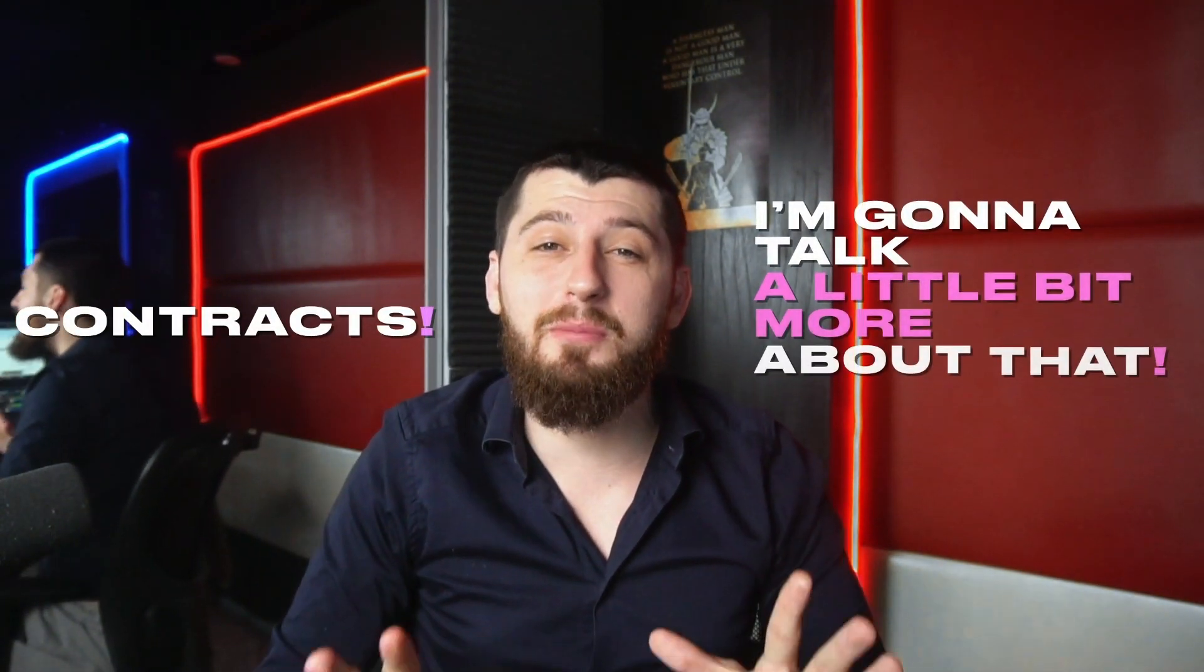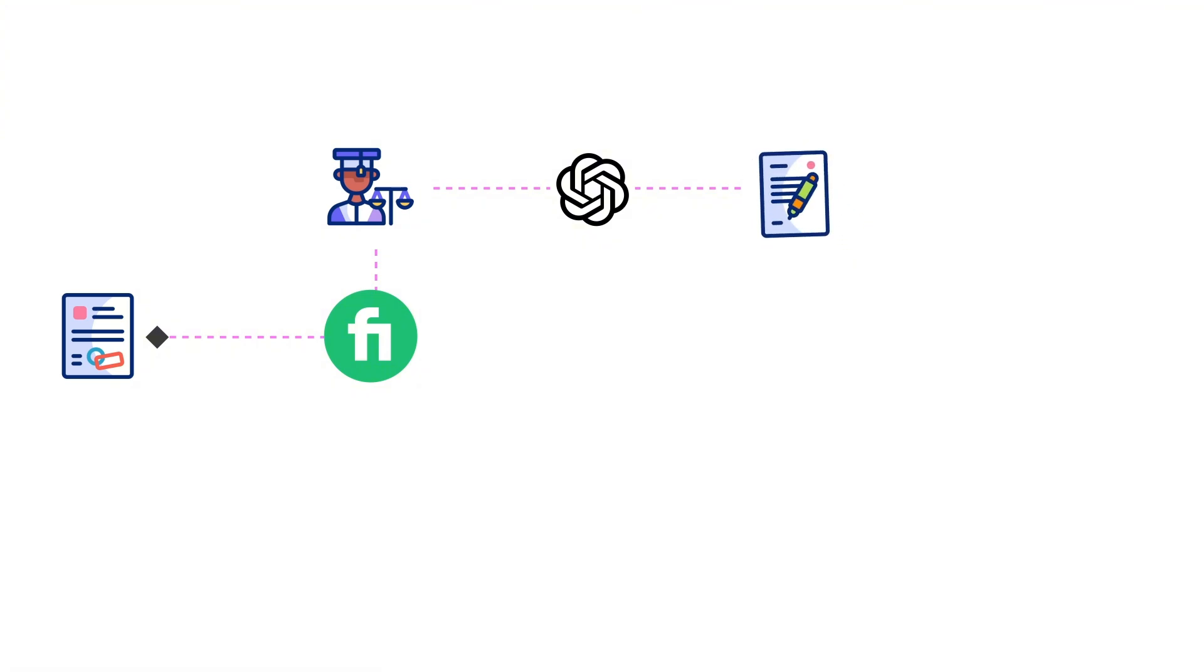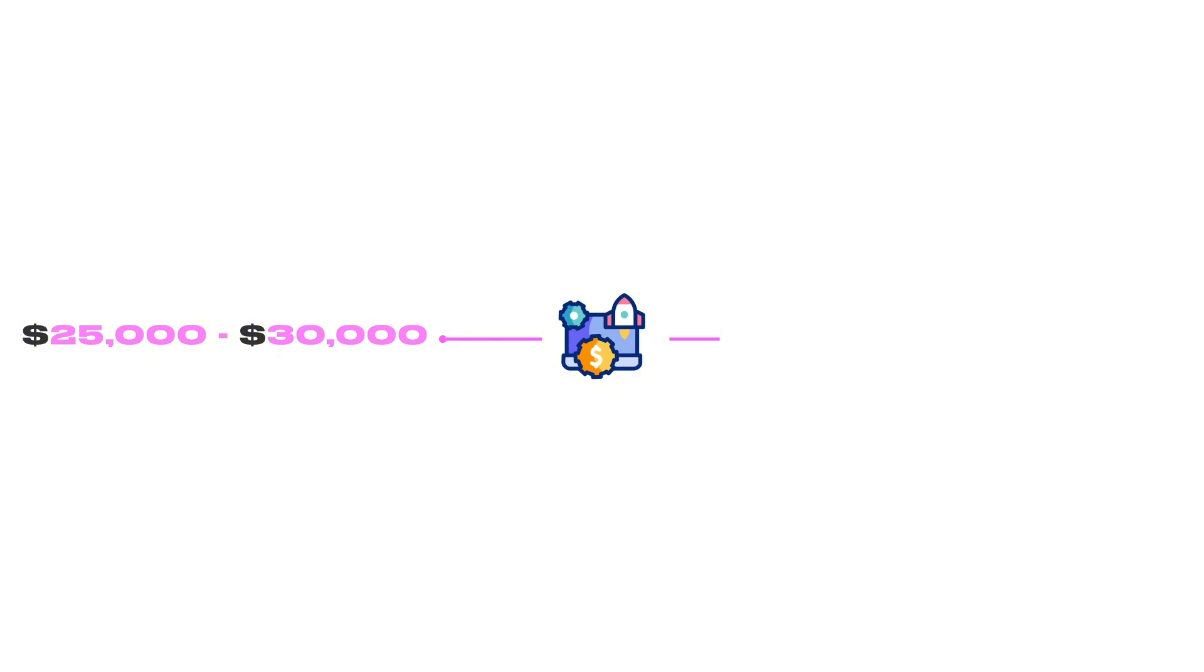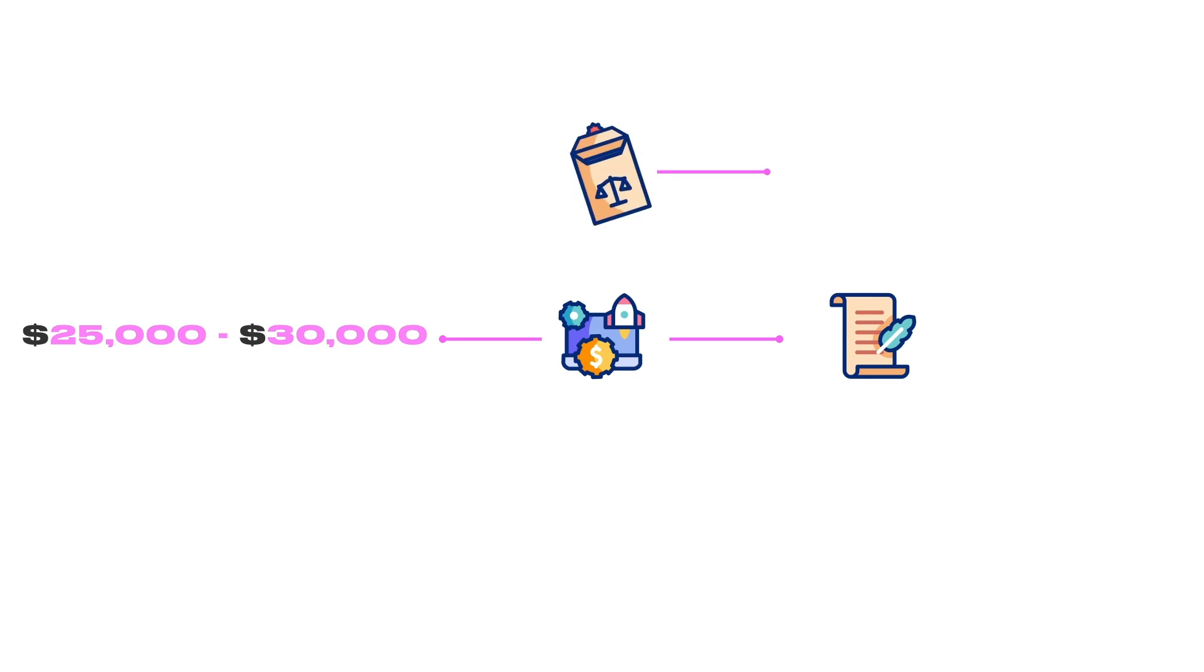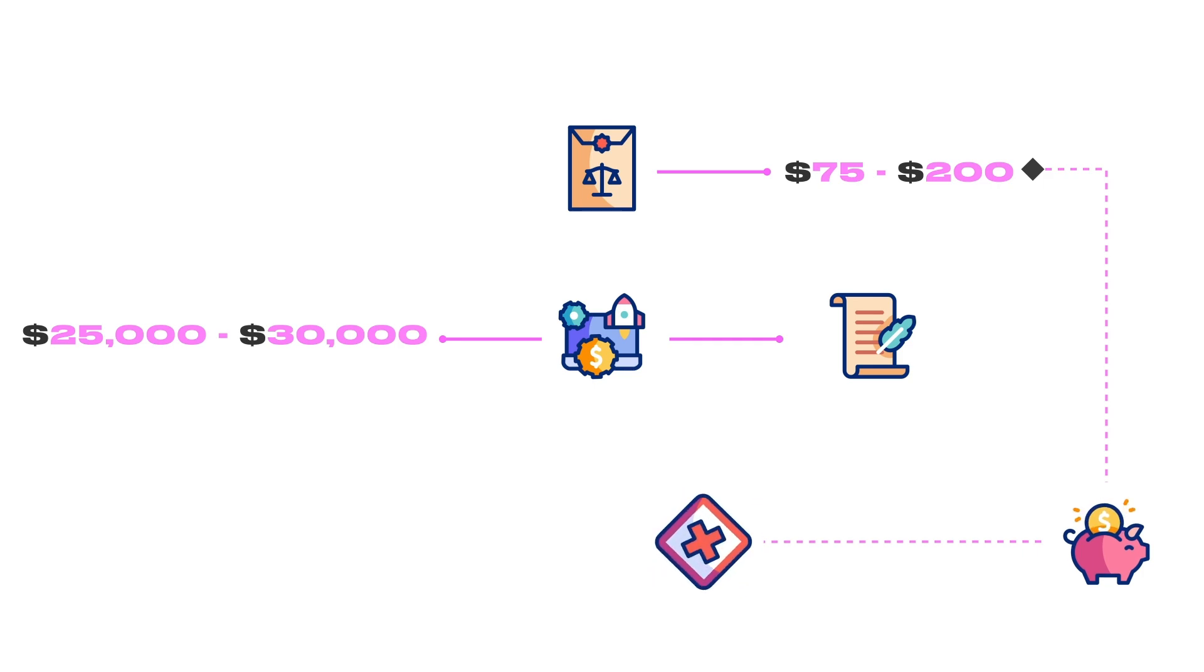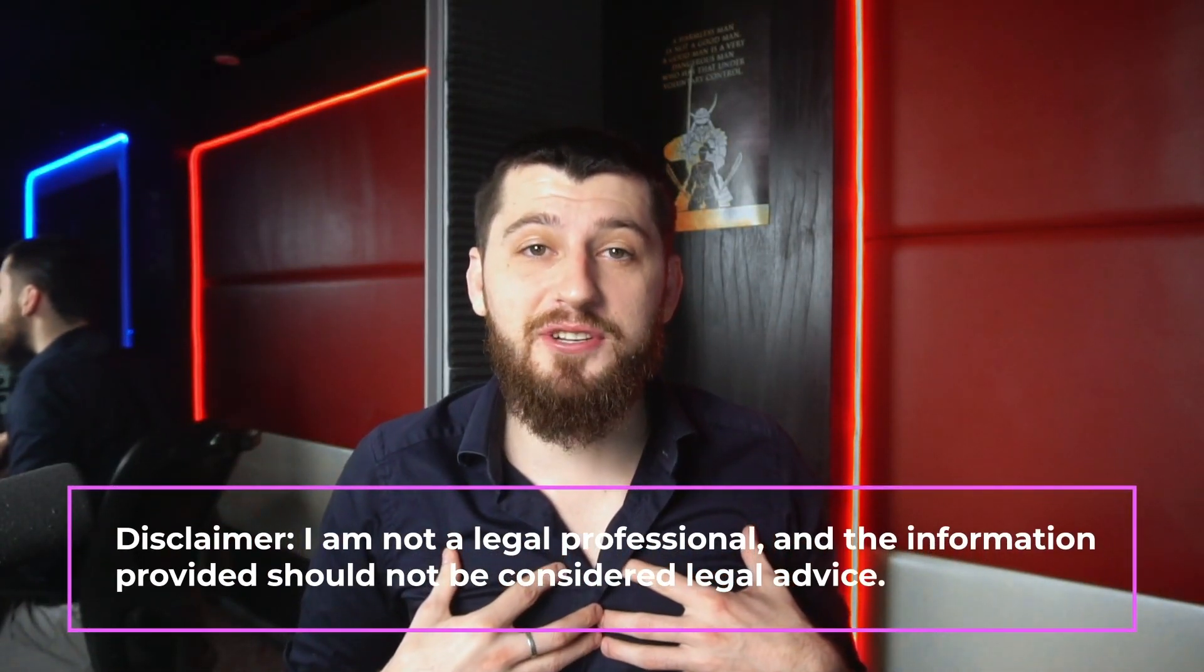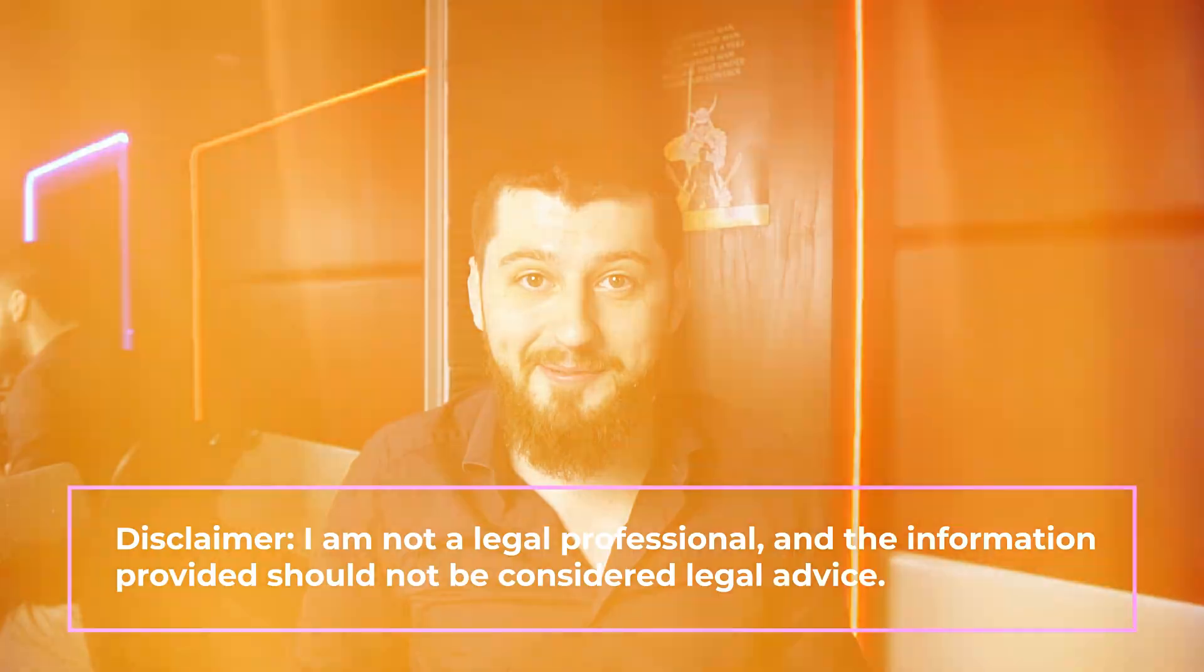Since we're on the subject of contracts, I'm going to talk a bit more about that. This is a simple template that I got off of a lawyer from Fiverr. I know a lot of them are using ChatGPT to generate contracts and it's pretty good for simple projects under $10,000. That being said, if you are going to do a project that costs more than say $25,000 to $30,000, it is highly recommended that you get a contract specific for that project.